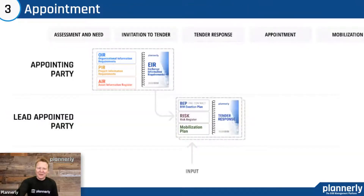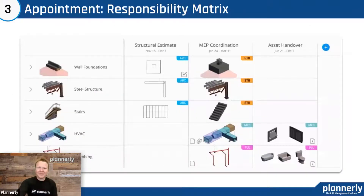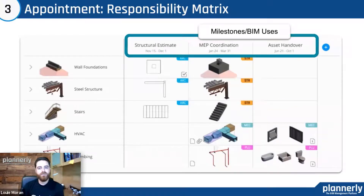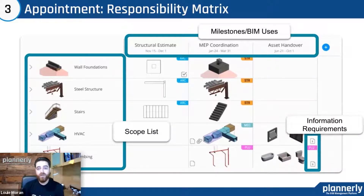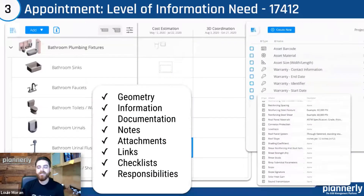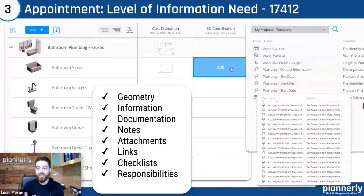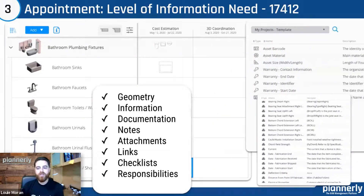Keeping all of that together is very important. In the appointment workflow, we select a lead appointed party who will start to include responsibility — all set up inside the scope with the responsibility matrix, task information, and master information delivery plans. Teams can visually understand the milestones or BIM uses, put in the list of required items — elements or documents — what information is required, who's responsible, and specify the level of information need.